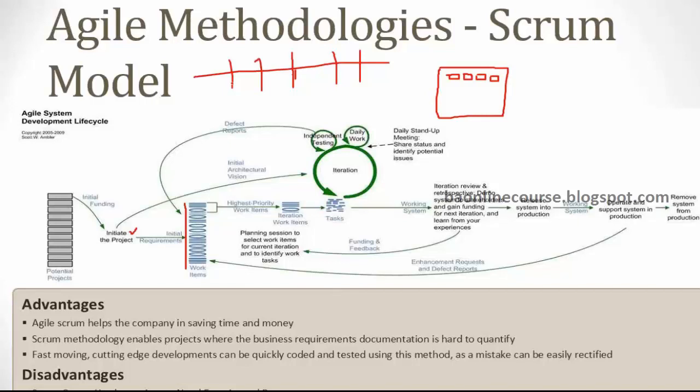So if you would have focused on the 20% functionality in the first iteration, right, you get the maximum utility. You would get that 80% of your time you could have used the system, right? So you are getting the maximum utility. So what you're doing effectively is you are finding out those key priority items, the items which would give you the maximum utility, which you'll use very frequently, and developing that as part of the first iteration.